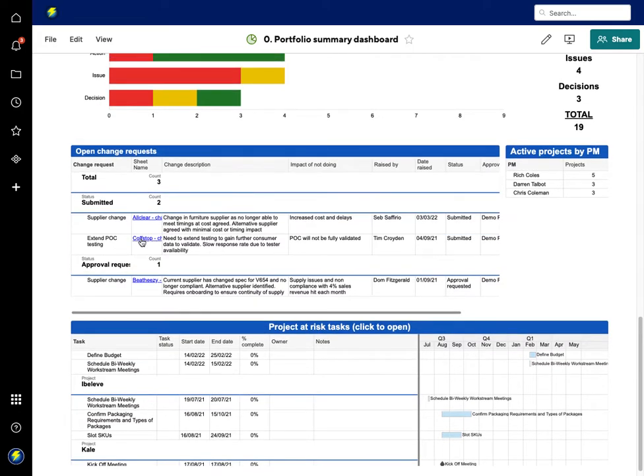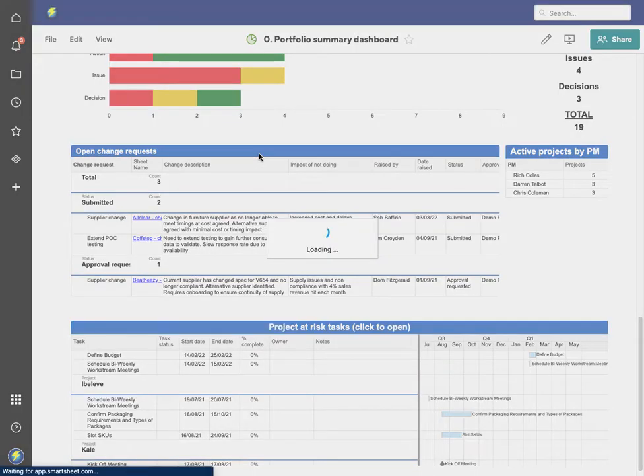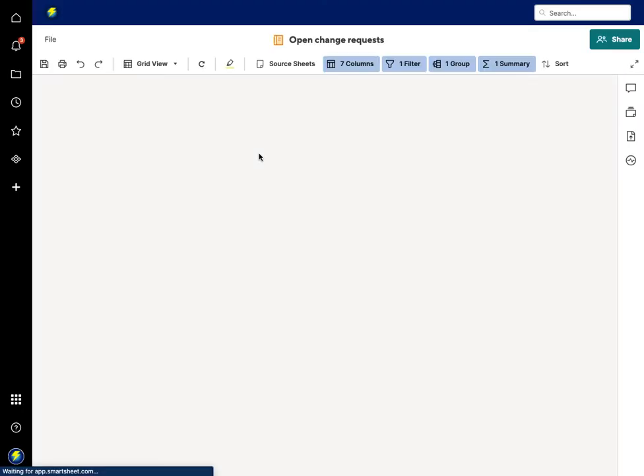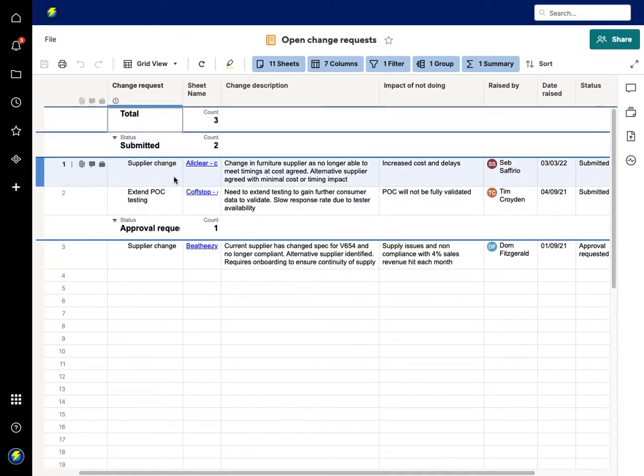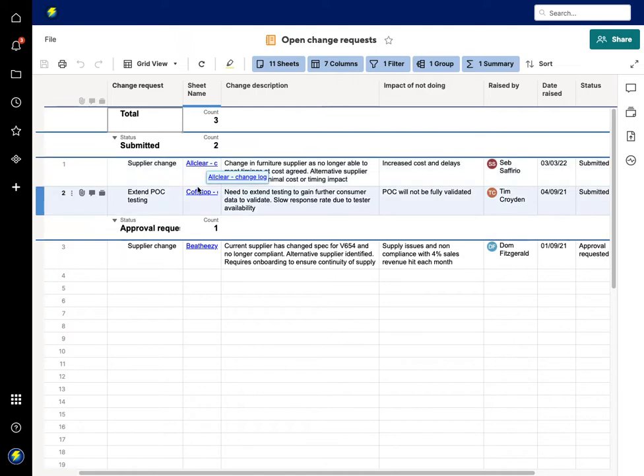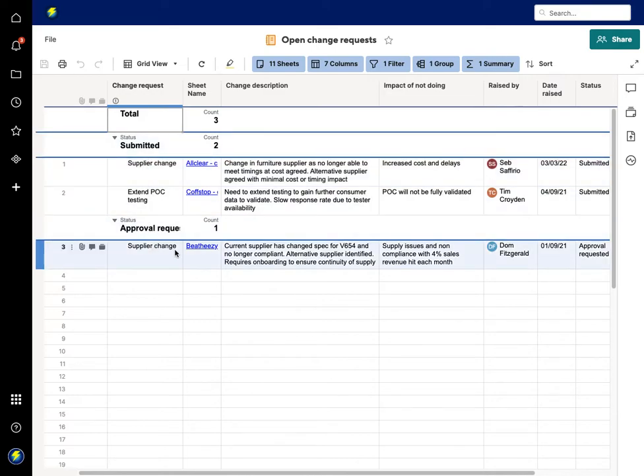Another way of approving is if you've got multiple approvers and you have a change board and a change request review meeting. If I now just click onto that, that's going to take me into the open change requests. I can see the various projects—it gives me the sheet name so I know exactly what the project is. Now I could be running a change control board, and we know what items have been submitted and what's been submitted for approval.